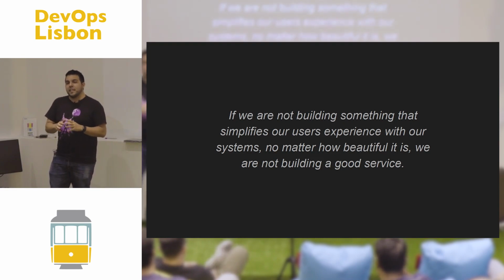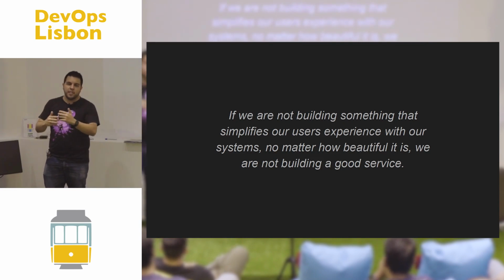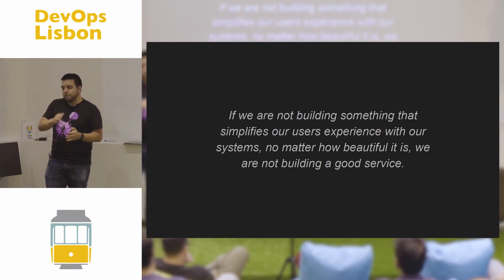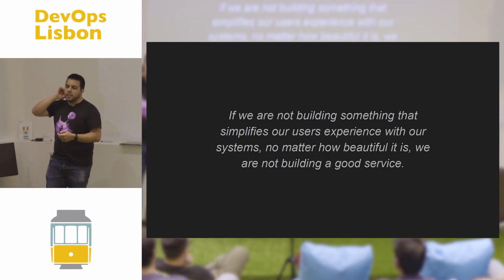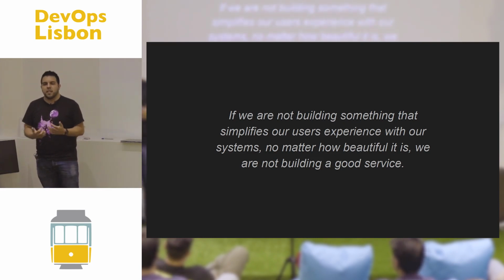Our promise is normally that everything you see in that quarter will be released by the end of the quarter, but we can release it earlier, because agile. However, because we have a lot of emergency things that normally happen because ops, we need to have some room for that, and that takes into consideration when and how they ask for things.